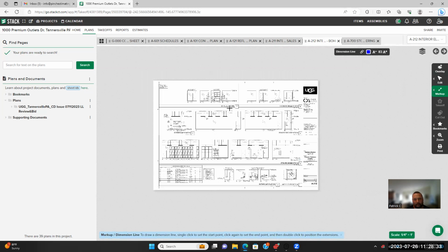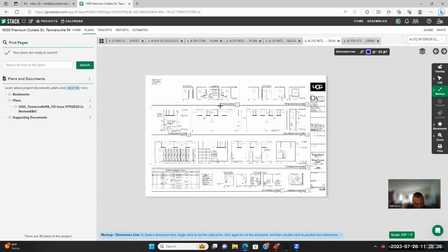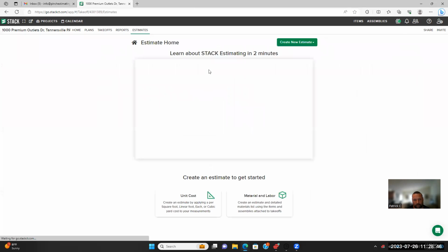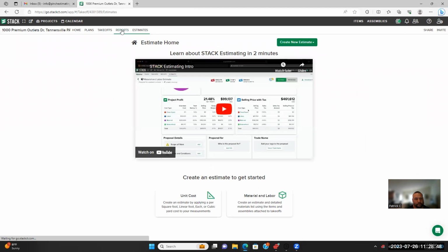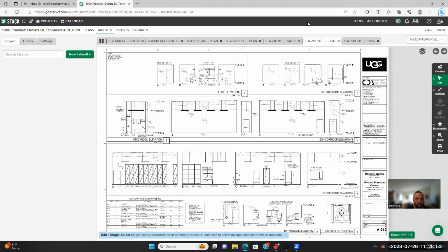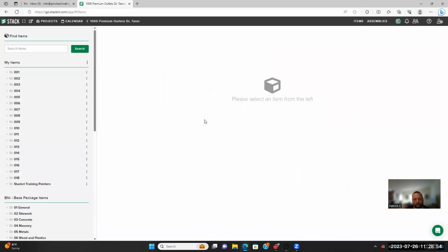Anything above 12 feet, I would say, is okay to use dry fall on, in my opinion. But that's what we're going to go with on this, just for the sake of this estimate here. Oh, wait, no. Items. All right, so we're building items here. So we got the primer and the 2 finish coats.